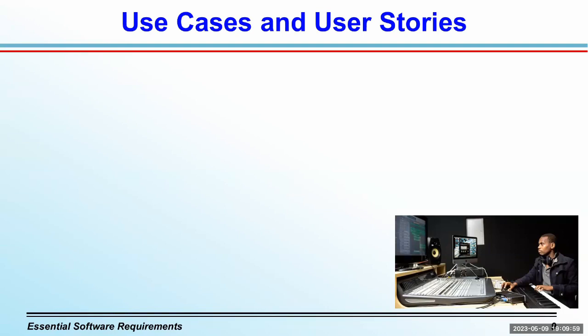Well, I don't have any personal stories. I suspect pretty much everybody listening has one, and I'd be delighted to hear what their own experiences were. But what can happen is if you overlook a significant stakeholder class early on and they don't get engaged in the project, then when those people eventually come to the surface, they're likely to be presenting some requirements and, more scarily, some constraints that we didn't know about. And now we have to adapt to and work around and patch in somehow. And that's, I think, the risk that we're trying to manage here.